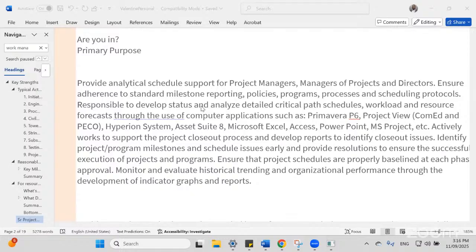How can we recover the delay? Such kind of analysis we need to provide them through the reporting system. Or in other words, why have we delayed the milestone? Is there any reason from the client side? Then we have to mention that and take a revised date from them. So such kind of practice we need to do here in milestone reporting.